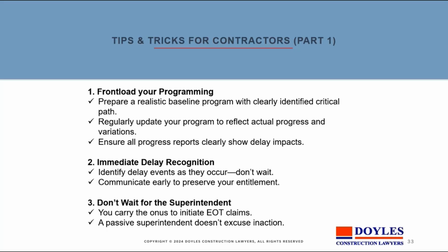I've been on jobs. One particular job is a tunnelling job in Fiji, and everyone said, well, the workers are hopeless. They can't get this job done. We'll have to change leaders and teams and everything to try and get somebody that can work. But really, the situation was the ground was later found, on proper geotech analysis, to be particularly hard, and that should have been recognised at the very earliest time.